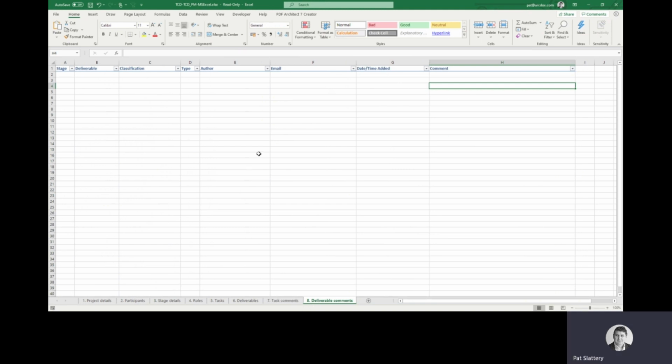Okay, so that's the digital plan of work file. It's a really useful tool for managing the BIM project. Whether you do this by creating your own Excel file, by using the NBS Toolkit, or you just write it out on a piece of paper, don't ignore this. Creating a digital plan of work, creating a responsibility matrix, creating the tasks for the project is hugely important to the success of any BIM project.